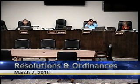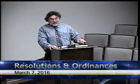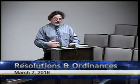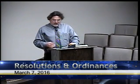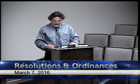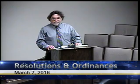Okay, and to answer his question about what type of improvements are going to be done on that subdivision, Southside Road is going to be completed between Ladd Lane and San Benito Street. The improvement agreement covers grading, all the paving for the interior of the roads, all the concrete for sidewalks, cross gutters and curbs, sewer, water, storm drainage, landscaping, irrigation, utility trenching, and any of the other improvements that are standard requirements of a subdivision.